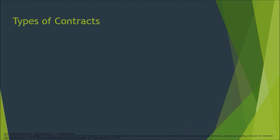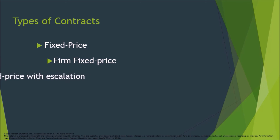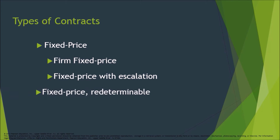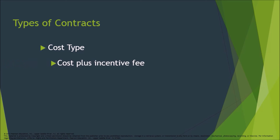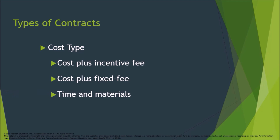Types of contracts — Fixed price: Firm Fixed Price, Fixed Price with Escalation, Fixed Price Redeterminable, and Fixed Price Incentive. Cost type contracts include: Cost Plus Incentive Fee, Cost Plus Fixed Fee, and Time and Materials.